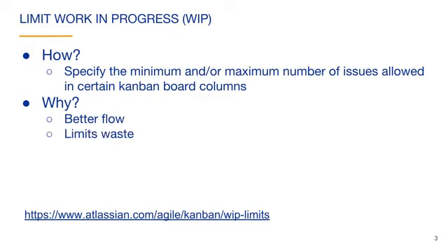Limiting work in progress also limits the amount of waste in the process. If there is an inventory buildup of issues in a status, there is waste because the work on the issues is delayed. Limiting work in progress also limits the amount of rework that may need to be done if there is a problem caused in an early process step but identified in a later step. There are simply fewer issues to fix.